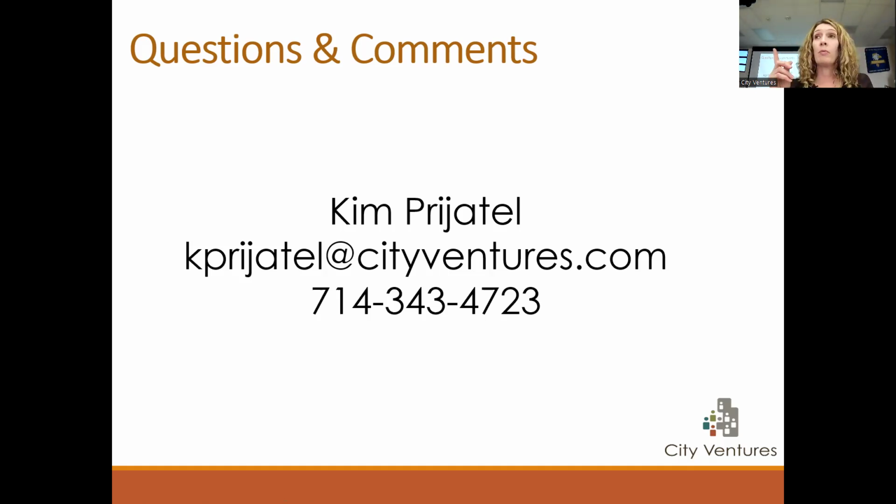I did want to mention, there will be one additional meeting for this project. Per the city sunshine ordinance, we'll have one more before we make our second submittal. We've made one submittal of our entitlement package, which includes our site plan, elevations, landscape plans, and all the drawings they require. We've received one set of comments back from the city. We're addressing those comments now, and then we'll come back to show you anything that's changed and resubmit to the city. You'll get a notice for another meeting in the same location.